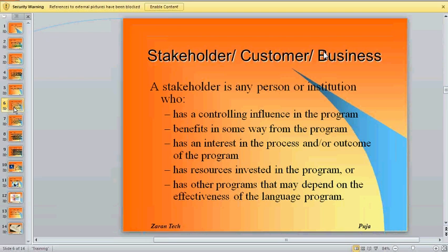If the bottom part of the pyramid was 60%, then maybe 30% or 35% is going to be your medium size. So if we chose 3 weeks to 3 months as small, then anything more than 3 months up to 6 months, or 6 to 9 months, is medium size. Anything more than that is a large size project.